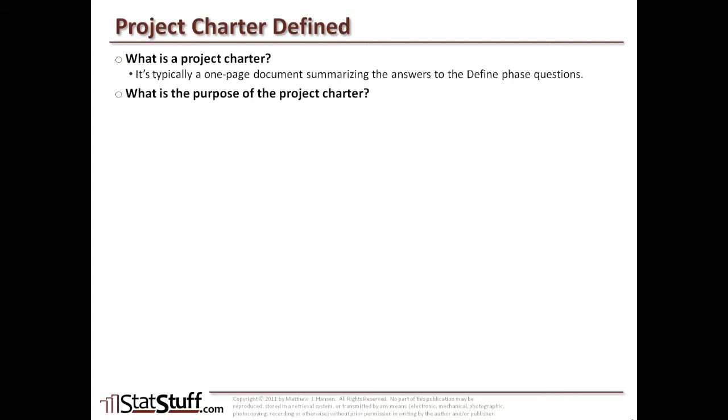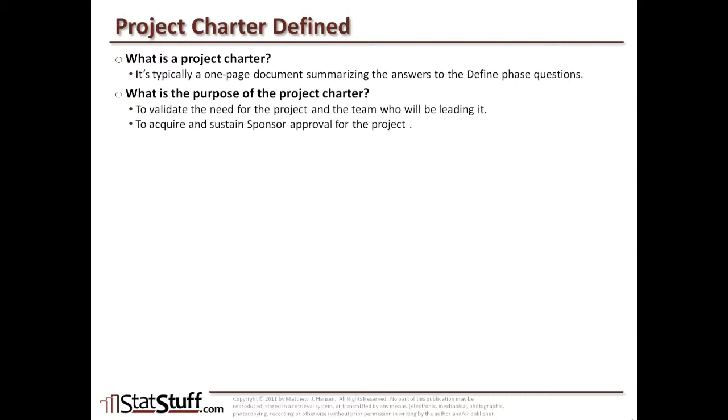Well, a project charter is usually going to be a one-page document that summarizes all the answers for the questions you're trying to answer within the define phase. Now, the purpose of the project charter is that you want to validate the need for the project and the team who's going to be leading that project. You also want to use the project charter to help acquire and sustain the sponsorship, that is, the sponsor's approval for the project.